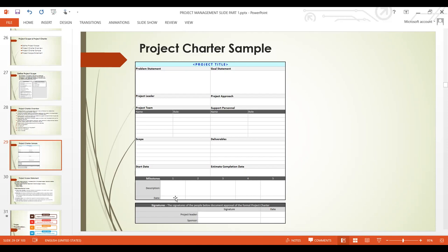And when you create a milestone, you must state the dates. You must state a date within the project plan where you are expecting to reach a milestone. If at that date, you have not reached that milestone, it is an indicator. These are some of the indicators showing you that you are not doing well. If you are missing your milestone dates, then you are not performing. These are some of the indicators.